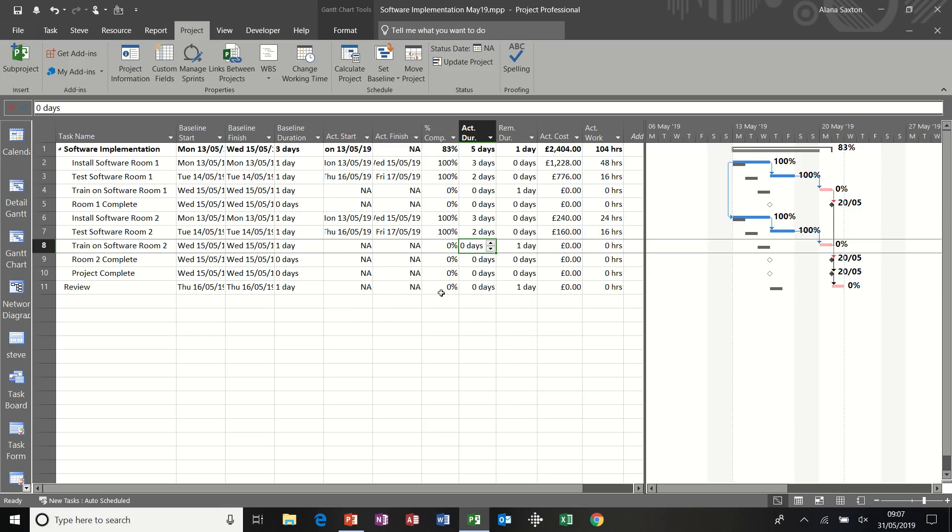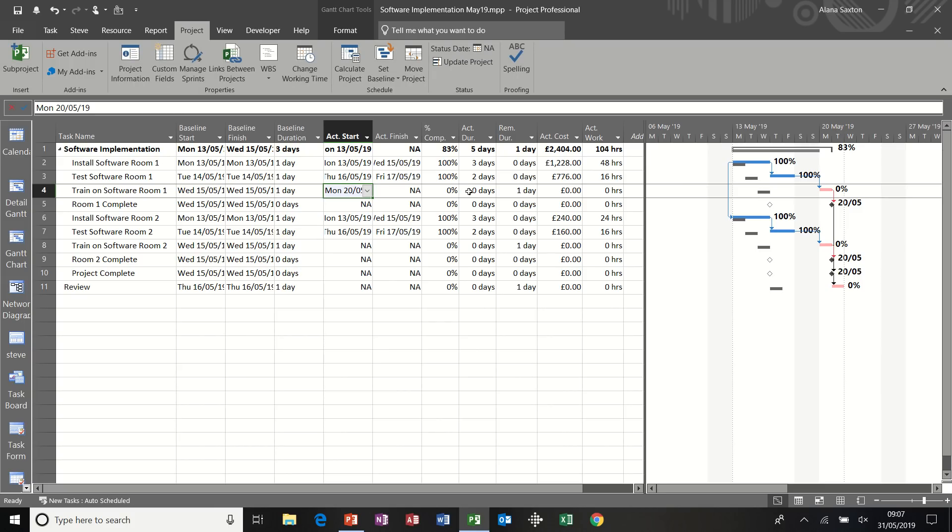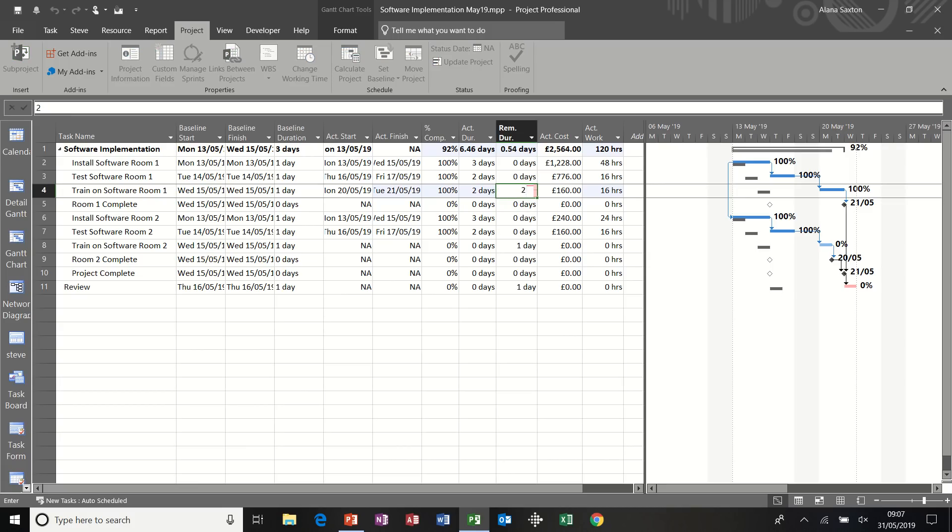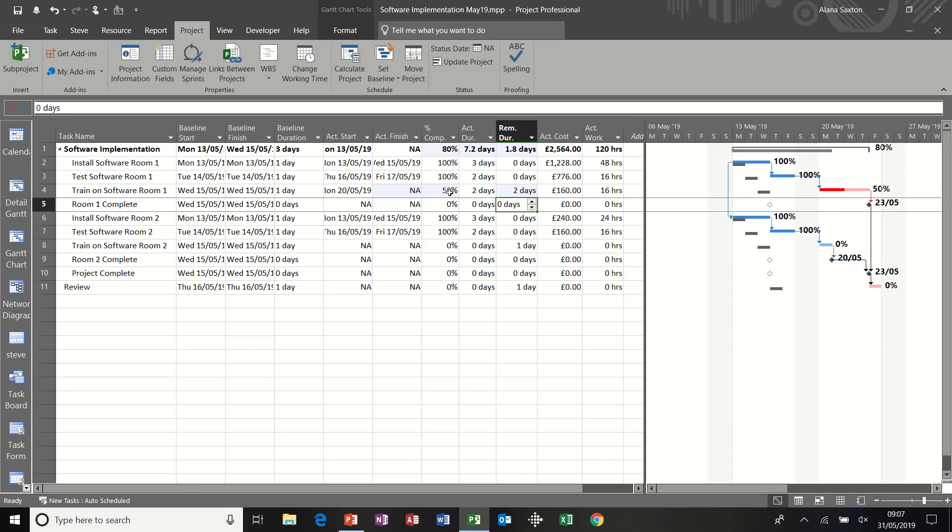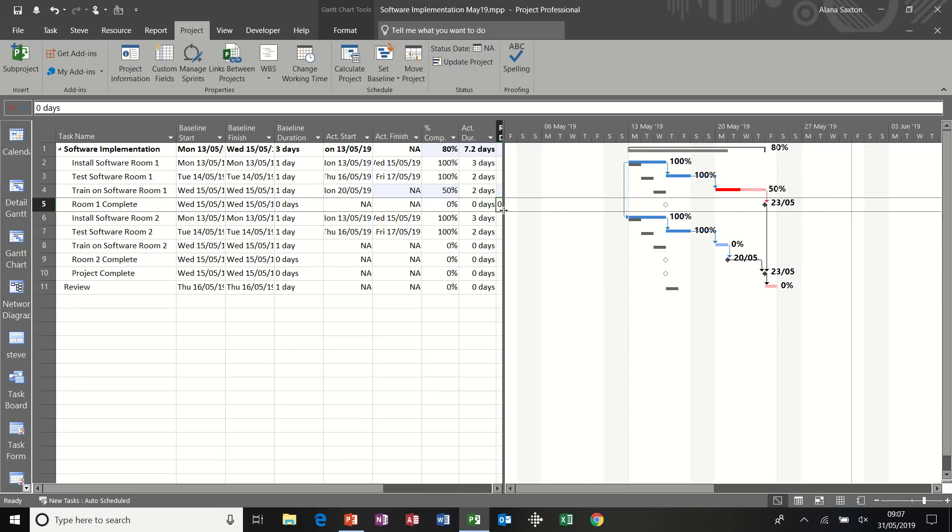And then I'm just going to update one more task to show you this one. So let's say this one started on Monday 20th and it took two days. So that goes 100% complete, but I'm now going to go, there is an estimated two days left. So that's now going to knock that back down to 50%. So it was planned for one day. We did two days, but there's an estimated two days work left. Something's gone wrong on site. And now before I do the same with the remaining tasks, I just want to have a look at this.